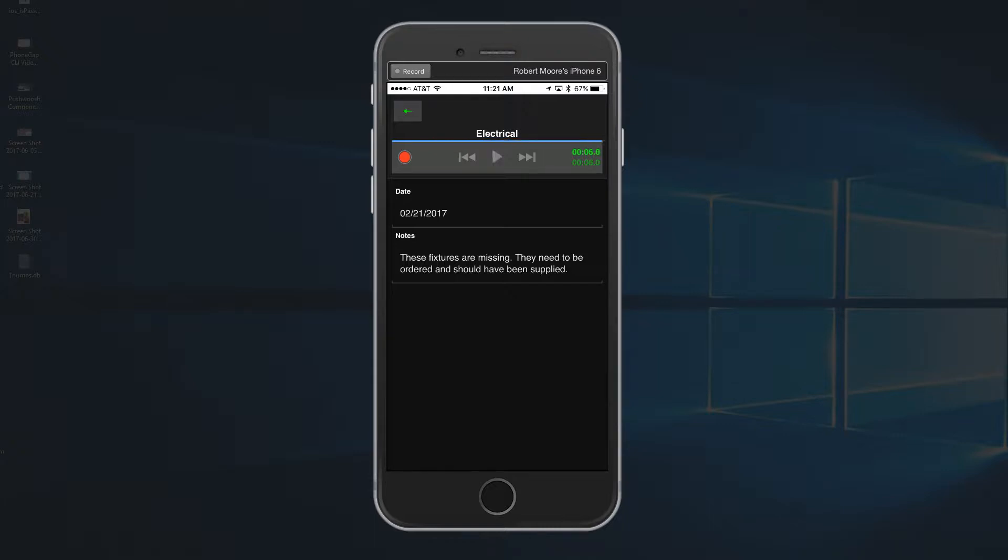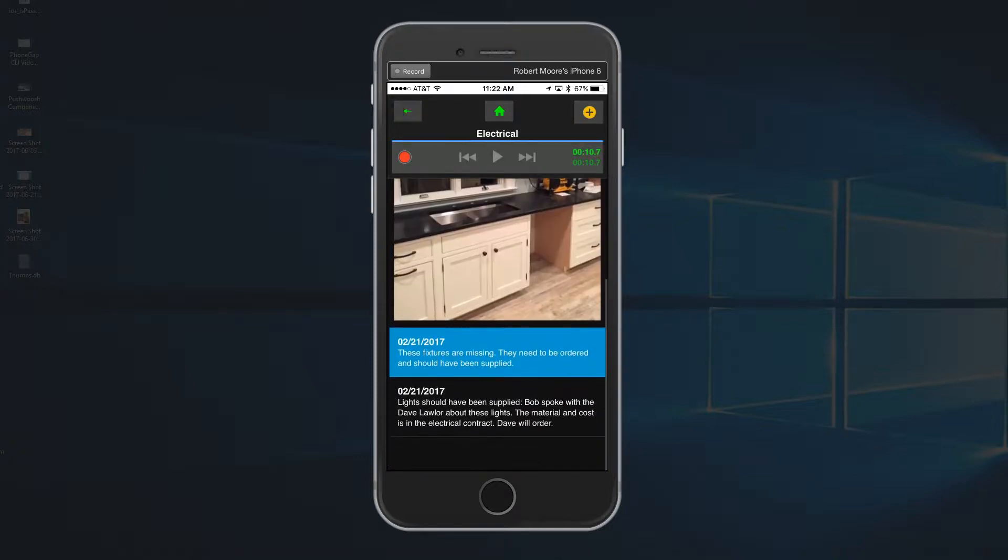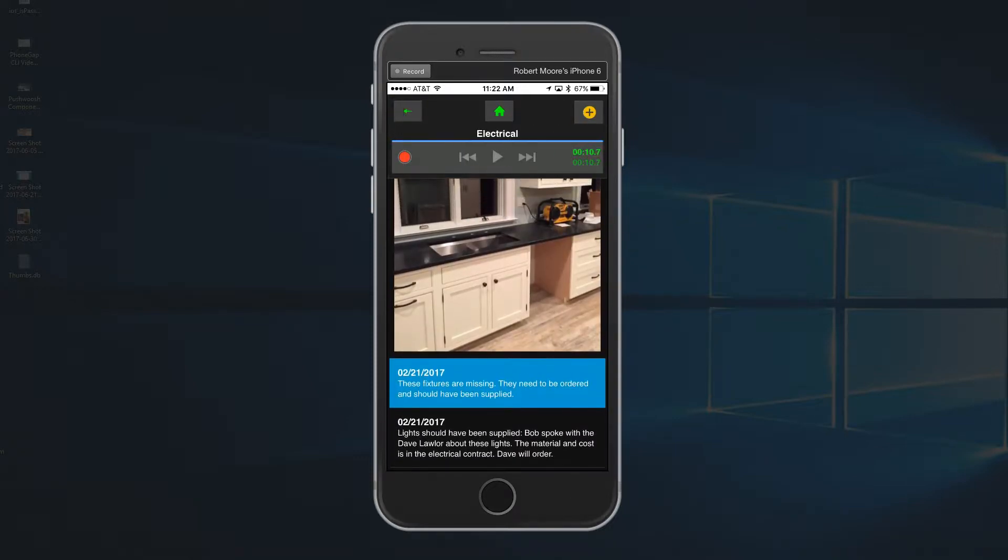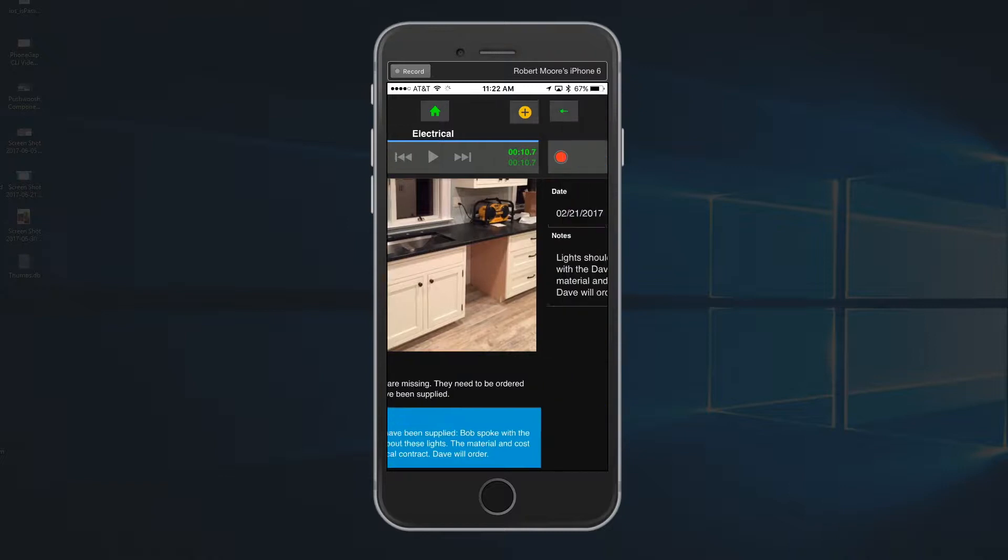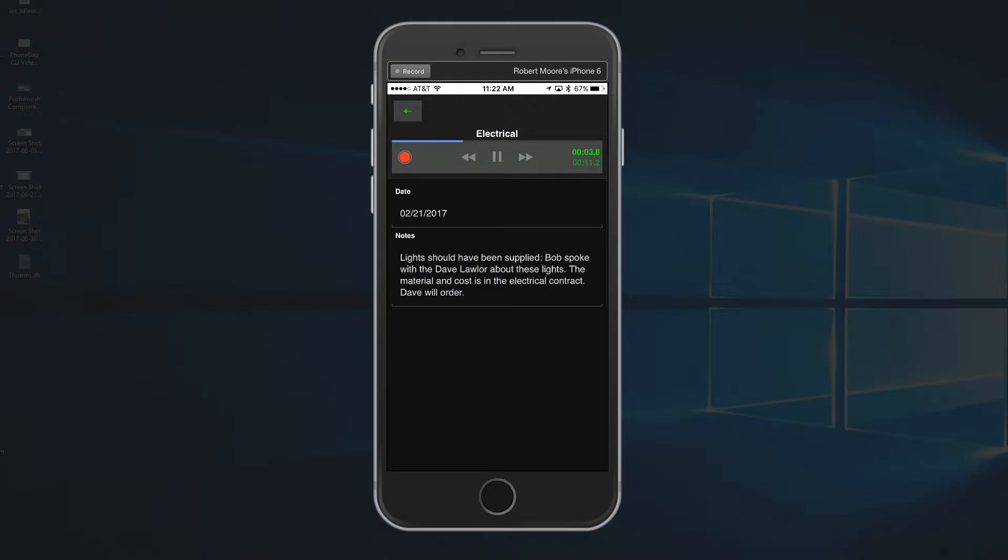And then we'll go back. And let's tap on the next item detail and we see that, yes, these should have been supplied and that Bob spoke with the electrician about it. And there's also another audio note here. [Audio plays:] I talked to Dave Lawler about this thing and he said that he agreed these fixtures should have been in his contract, so he's going to go ahead and order those.